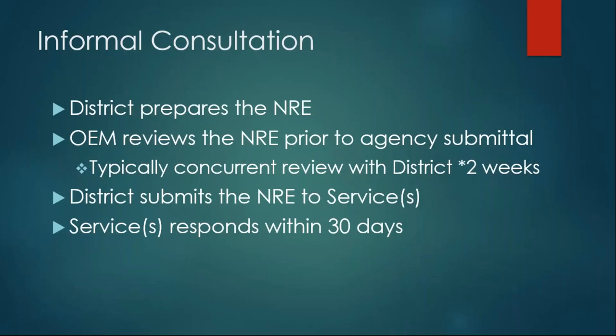Earlier, I talked about informal consultation versus formal consultation, and let's talk a little bit about informal consultation first. In this scenario, the district or the Turnpike prepares a natural resources evaluation. This is for federally funded projects. If we are sending the NRE to the agency for concurrence, OEM will typically review that NRE prior to agency submittal.